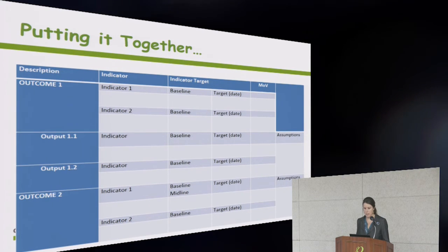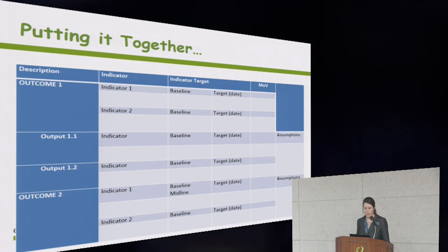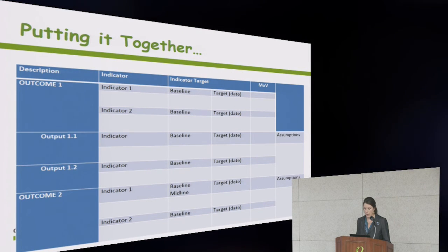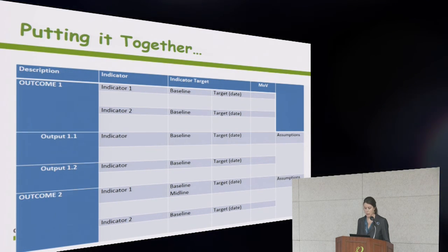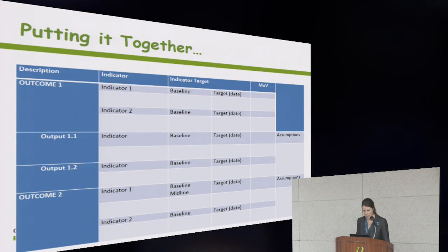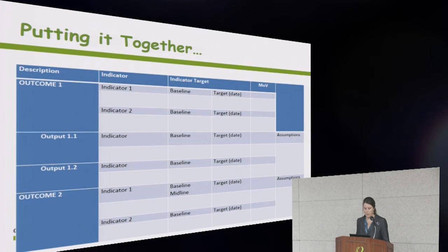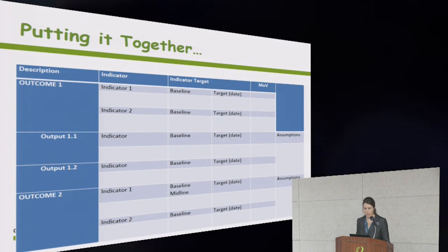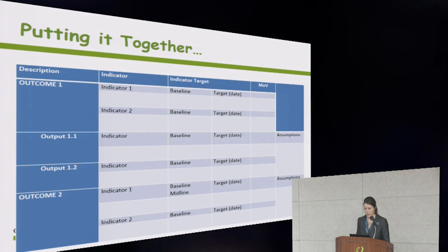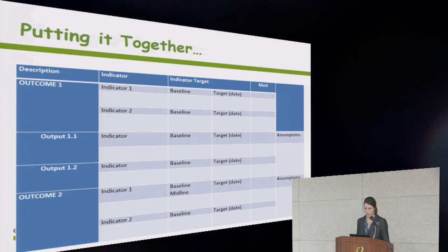The PPF is designed only to include the M&E plan without baseline data or targets. This is because the baseline study is supposed to be done after the planning is finalized, like we just talked about quite a bit. So after the baseline study is complete, then GNI field countries should submit the final framework, which you see here, which does include the baseline data and targets.